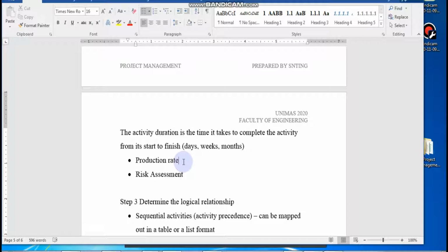So the resources data sheet that is available should be attached with what we call a production rate for that particular resource. Yes, it's a very bookish kind of resource, meaning that you get it from catalogs, but you need to factor it up or factor it down. Some you get by actually working with that subcontractor or your team of people; you know how much they can do in a day, you see. So you can always factor it down 30% or up by 10%. You can play around with the production rate. It is not a fixed one.